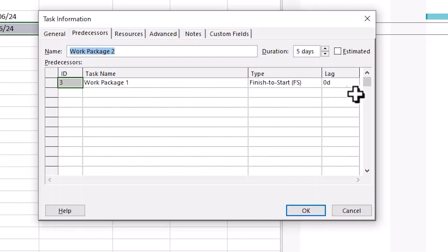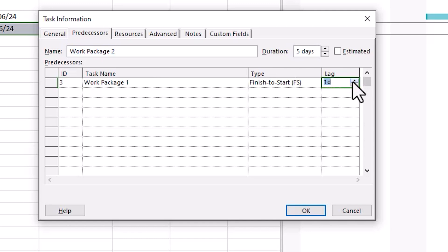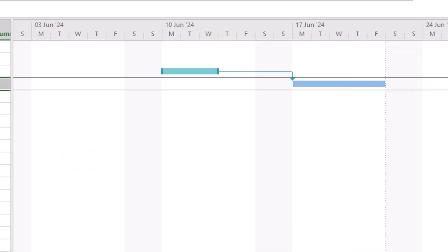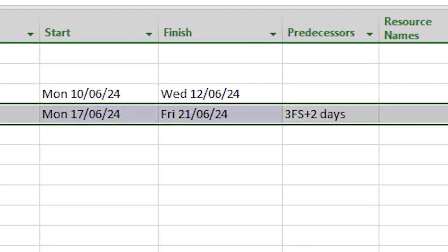In this example I used a Finish to Start relationship where our task starts as soon as the predecessor finishes, but I've now added two days of lag. You'll see the outcome of this. The predecessor finishes, then two working days later the second task starts. Note how this appears in the Predecessor column: 3 FS plus 2 days, meaning the task is dependent on the task in line 3, FS means that it's a Finish to Start relationship and plus 2 days means there are 2 days of lag.